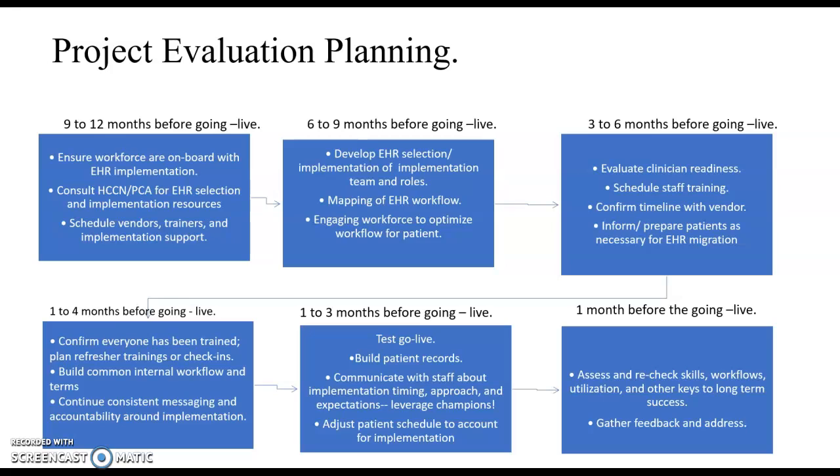During 3 to 6 months before go live, we'll be evaluating clinical readiness, scheduling staff training, and also preparing patients as necessary for EHR migration. During 1 to 4 months before go live, we'll be confirming everyone has been trained, and we'll be planning refresher trainings or check-ins, building common internal workflow and terms. So we'll also be continuing consistent messaging and accountability around the implementation.